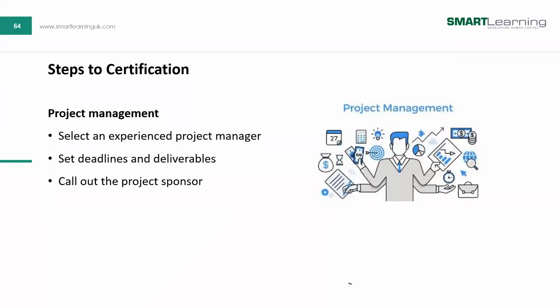Okay, the business should also set deadlines and deliverables, like put everything out on a Gantt chart, so there's an outline of the project, and of course you have deadlines and deliverables and resources. And then of course figure out who should be a project sponsor. In two projects I did in 2017 and 18, the project sponsor in those was the CFO. And you can imagine the chief finance officer being a project sponsor and believing in a project is smooth sailing typically. Yeah.